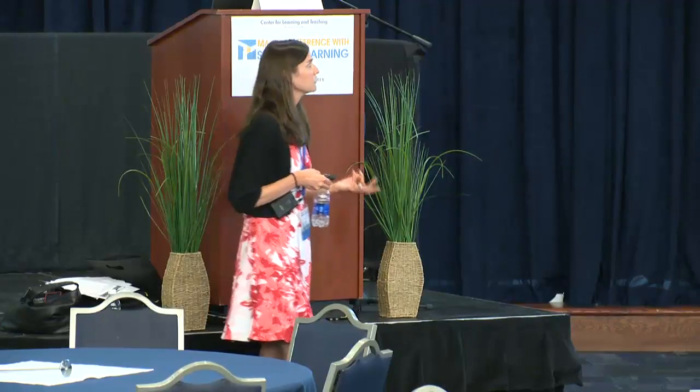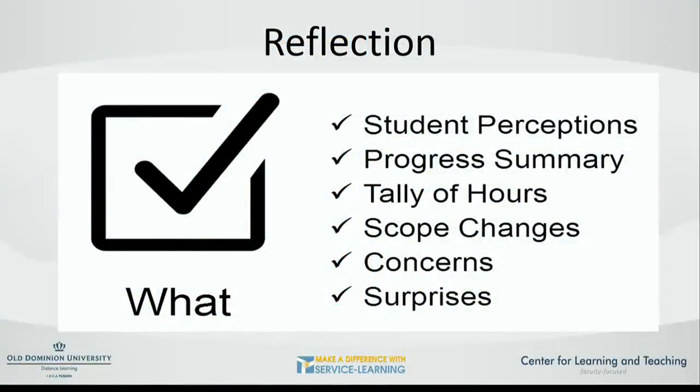So when we look at reflection, this is where we're looking at the what. In reflection, you want to see what your student perceptions are. You want them to provide you with a progress summary. This comes in handy more so for the projects that are going to last a couple of weeks throughout the semester. You want them to tally their hours and let you know how much time they have spent working on different tasks. You want them to be able to scope changes.